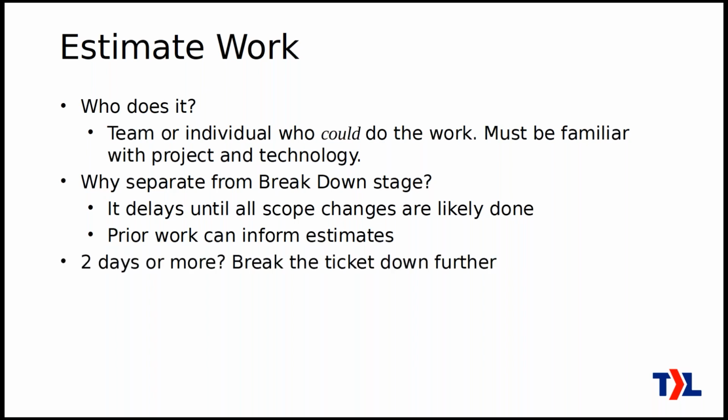So if you're using hours and you end up with an estimate of 2 days or more, then you're going to have to break that ticket down further.